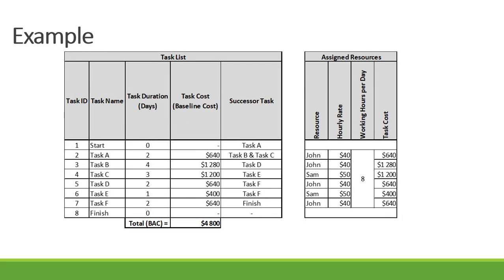So let's have a look at the example. We've got task A to task F, each task has got a duration, then we've got our baseline cost or total cost, and the total cost is calculated from the assigned resources. For task A, John has been assigned at a rate of $40 per hour, and the working hours per day is 8 hours, so it's 40 times 8 = 320, times 2 days = $640.